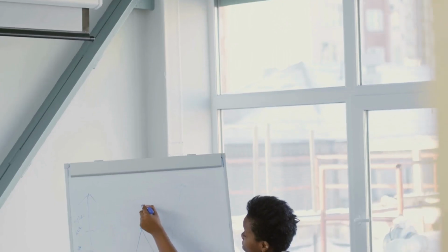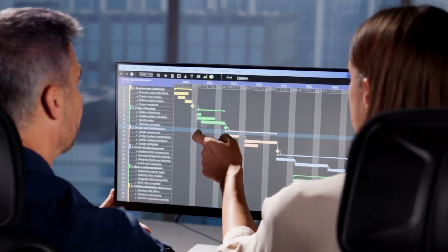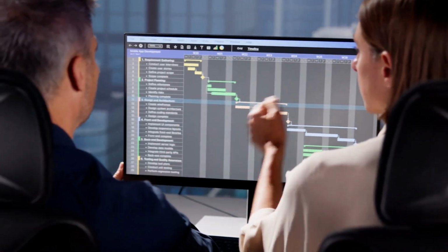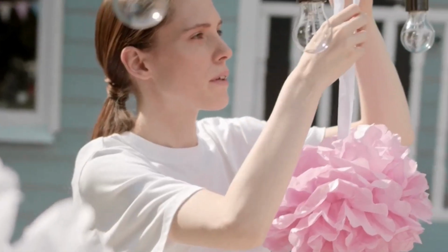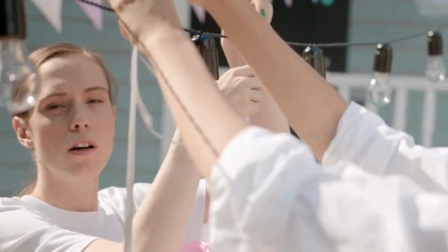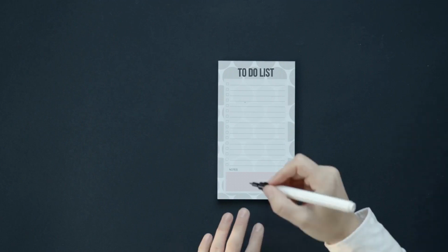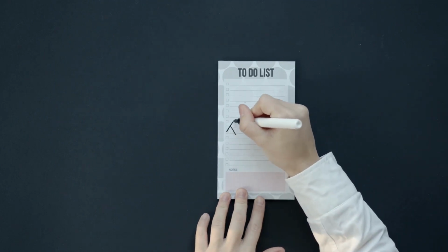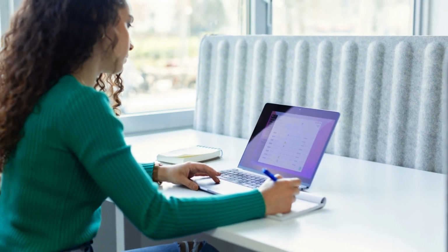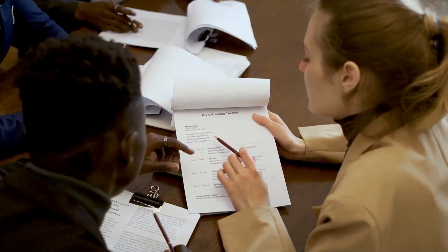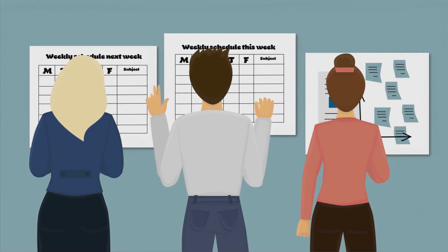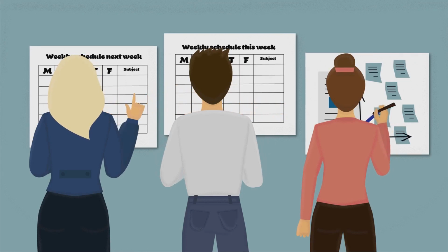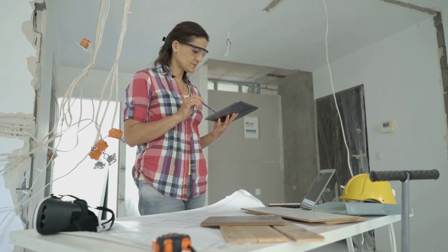Dummy activities, bridging the gaps in precedence. Sometimes we encounter situations where multiple activities share some but not all predecessors. This is where dummy activities come in handy. Let's add a task to our birthday party. Prepare party games, activity G. It can only start after the decorations are set up, D. Now activities F, guests arrive, and G, prepare party games, both depend on D. But F also depends on E, pick up the birthday person. If we simply draw arrows from D to F and G, it would imply that G also depends on E, which is incorrect. To solve this, we introduce a dummy activity.